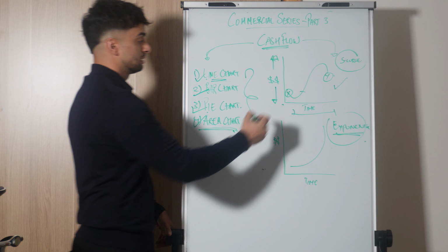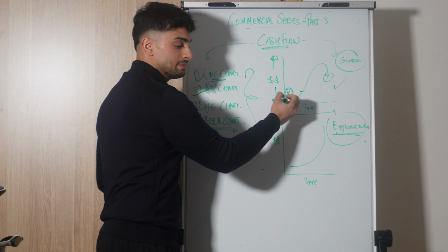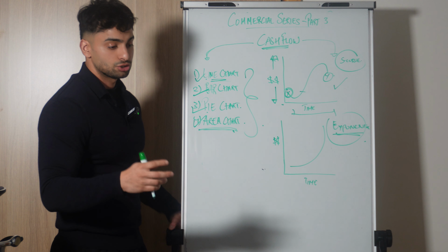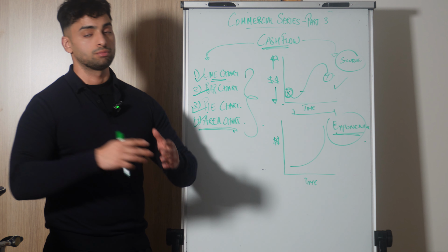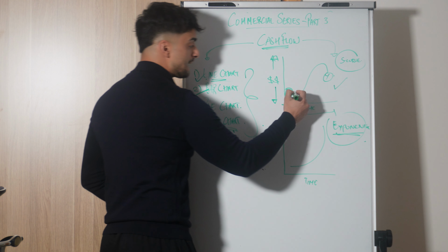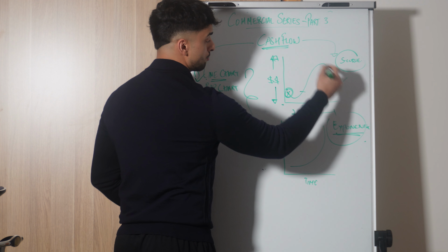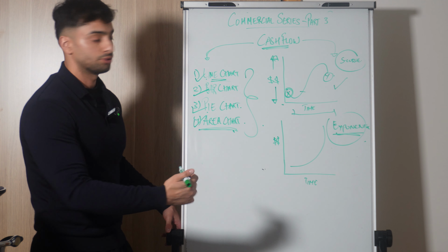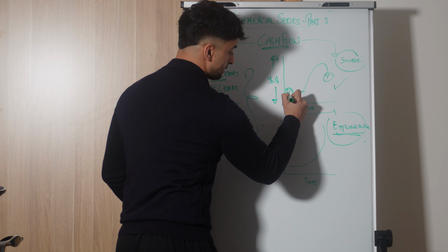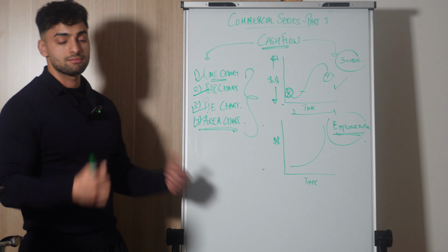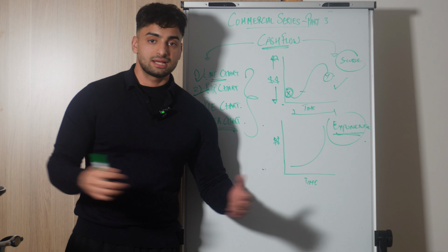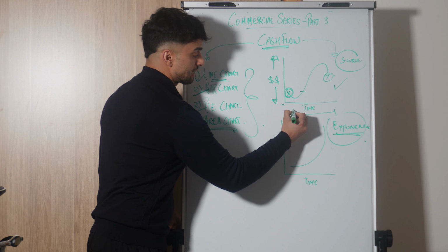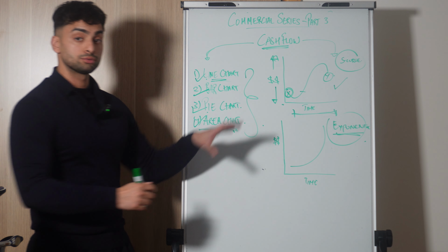That is simply because in the first month, when you're starting the project, there may be only a certain amount of funding you may need to fulfill the operational or logistical cost of that house or whatever you may be building. But as you progress to build more, or to further expand into that project, you may need more money. You need to understand exactly, because no one has the amount of money that goes into a project these days. Everything is on top of the cost, so you need to understand that you will be getting this cash S-curve and also be giving it to your lender.